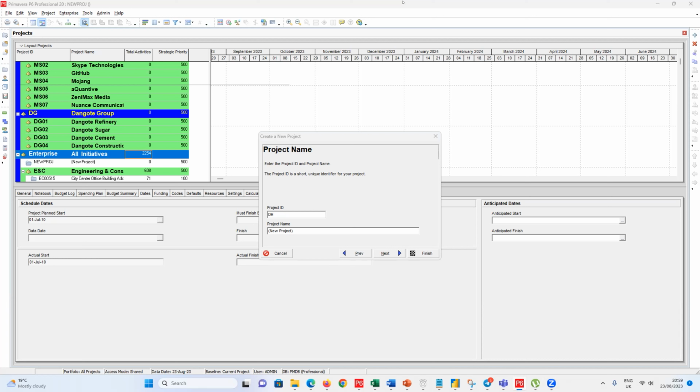So you don't want to say DH1, DH2, because you will quickly get to 100. In most cases, people will just put DH001. Do you understand where I'm coming from? Before they even get to 1, they would have built like 100 houses already.